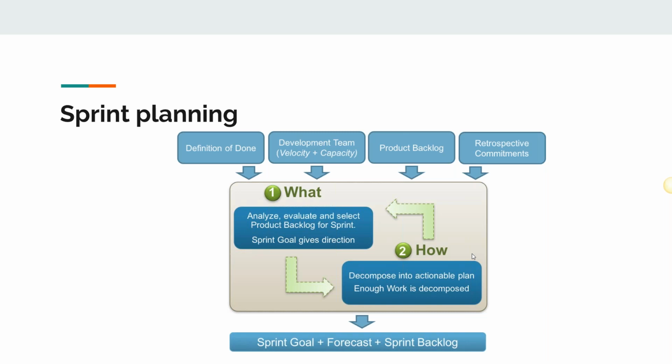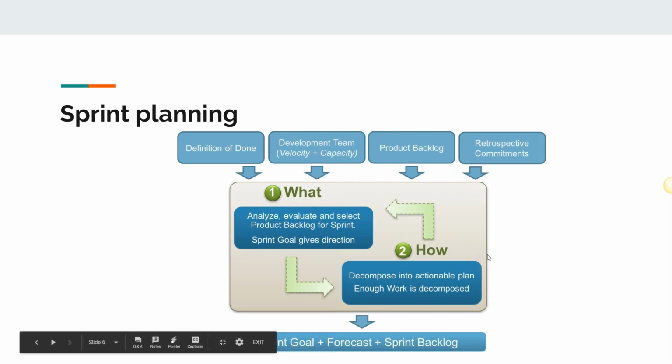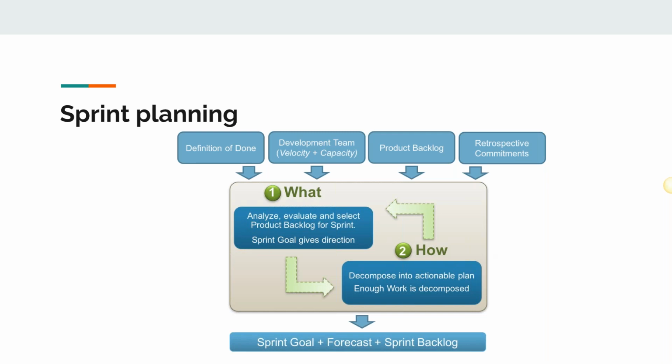One person is going on leave, so there are only 4 people. Usually you do so and so amount of work when 5 of you are there. It cannot be the same when one person is missing in action, right? One person is not going to be available for the sprint, so of course you have to take him out, right?